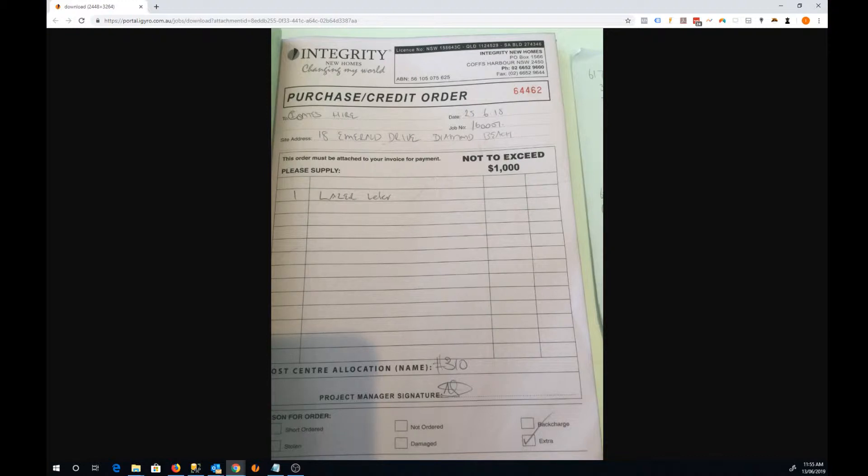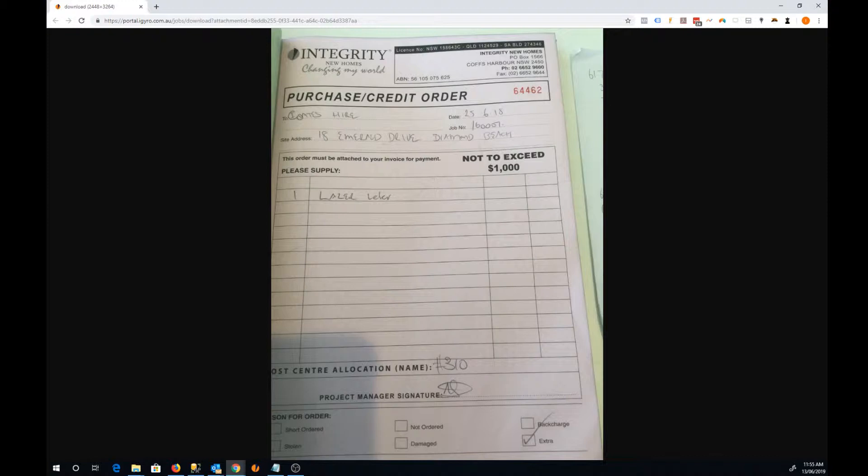The process here is to have a manual purchase order book. They would write the details out to that particular trade or supplier, put the site address in there, put a brief description and sign it off, and hopefully put a cost center in there for the accounts department as well.